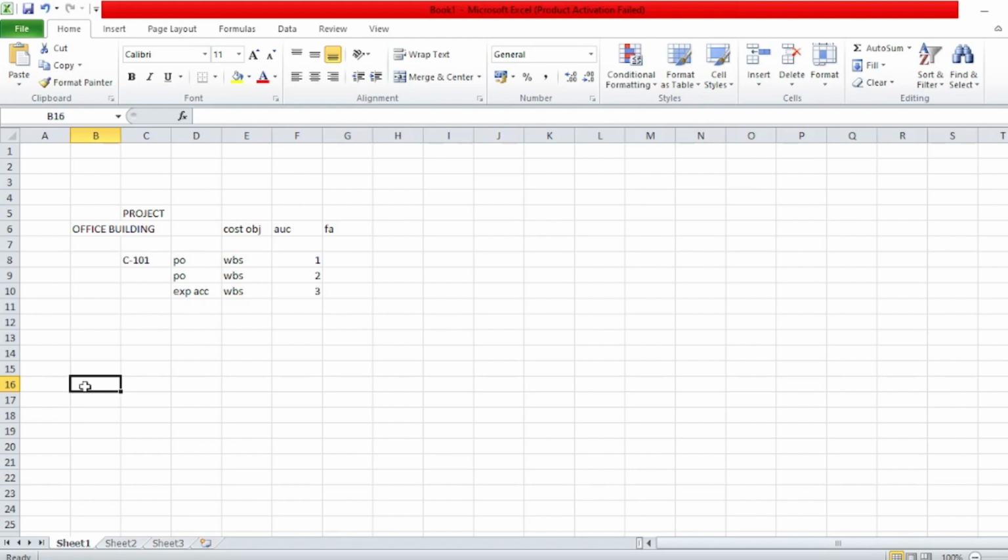For example, they might have a project for marketing spend, a different project for store opening, or for store maintenance, or for office maintenance, annual office expense monitoring, tracking, and all. So for each of these types, they would like to have a different template created in the system. So each time they want to create a project for a marketing spend, they can just pick up that template, and it will copy the entire project hierarchy from that template into the project that they want to create for that year, or for whatever purpose, right?